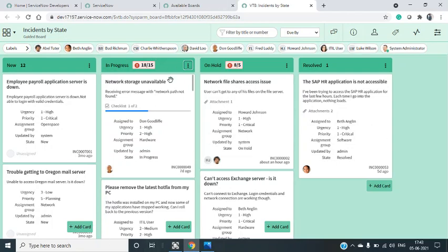If you go to the in progress column and it is going beyond the WIP limit, as a team we have to see why many tickets are in the in progress column, find the reason, and work on those issues as a team and move the items to the resolve state before taking up any item to in progress.